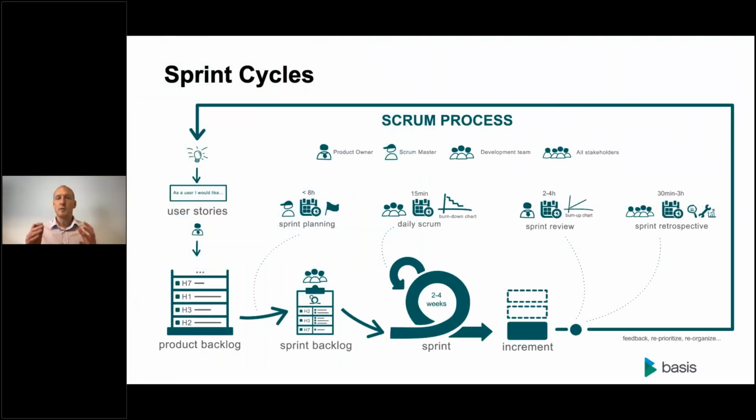First of all, we need to understand the process and the concept of Scrum. Scrum is based around these things called sprints. And this is where we come back to what I've mentioned multiple times already, where we're breaking our work down into smaller defined units. Typically our sprints will be anywhere between 2 and 4 weeks long. We'll have a small team, and I'll talk about the team in a minute, working on a defined amount of work in that 2 to 4 week period. The work we've defined and agreed we're going to aim to do is called the sprint backlog.